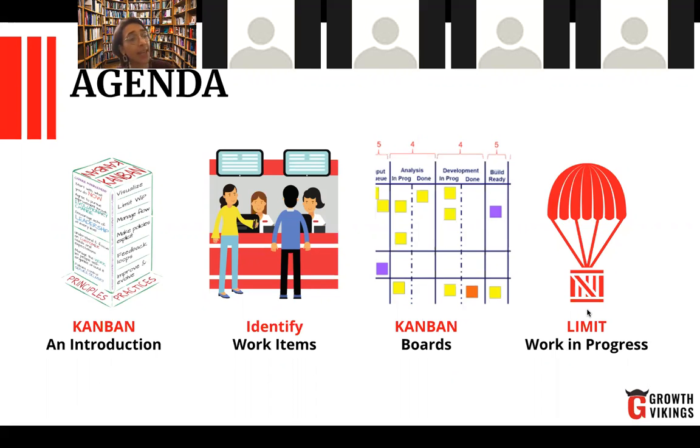Because we're going to see that you can have a Scrum approach and still not have a pull system. And that's going to be important for us because we're going to learn that pull systems allow us not to have overwork, to manage better our capacity, to improve our productivity, and hence be able to manage or have more control of the delivery time, of the customer satisfaction, and the quality of the product. So we're going to learn that it's important, okay?